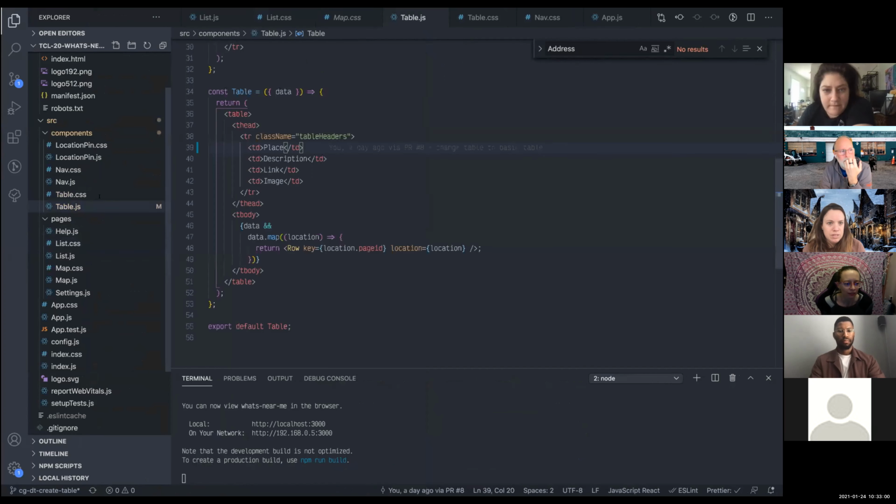All right. So what's the big deal, you ask? Maybe you didn't ask, but I'm going to tell you anyway. Stories ideally should have these following characteristics, and ones that are too big usually don't have all or most of these. So these stories should be independent. They shouldn't be dependent on other stories. A big story is going to be dependent on multiple stories, but one of those individual stories should be able to be done and shipped in relative isolation. Sometimes there's a sequencing thing there, but in any case, it should be something you could do on its own.